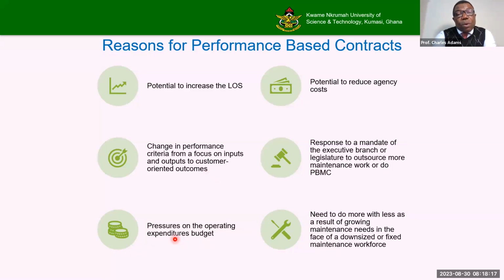When governments or road authorities don't have enough money to invest upfront, where they can, they structure a contract so that it is paid at intervals when it achieves certain milestones, and this form of contract becomes a very useful way of doing that. So, for example, a lot of contracts go through contract overruns, price escalation, all of that.